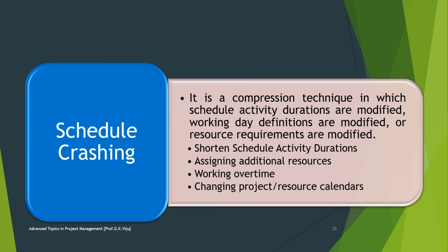Schedule crashing means, as per the PMBOK 6th edition, a technique used to shorten the schedule duration for the least incremental cost by adding resources. Afterwards, you will apply crashing to those activities. So in crashing, you will review the critical path activities and find ones that can be completed early with extra resources that can provide the highest compression with the least cost.